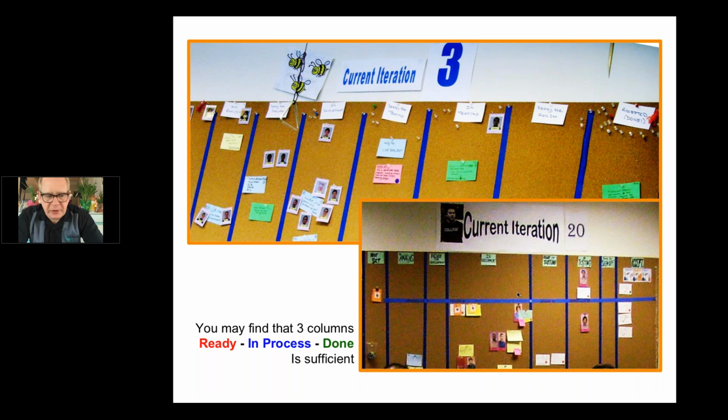So those are just a couple of strategies. Go completely digital, have some combination, or completely physical, and make sure that you're communicating readily between rooms to update the rooms of the status. Because I can tell you, you can move a card in Jira and the remote team won't know it. Here, if you have the web open and you require them to move the card, or make sure they move everything at the daily stand-up, then they will actually know that it moved. Yeah, definitely. All right, next question.